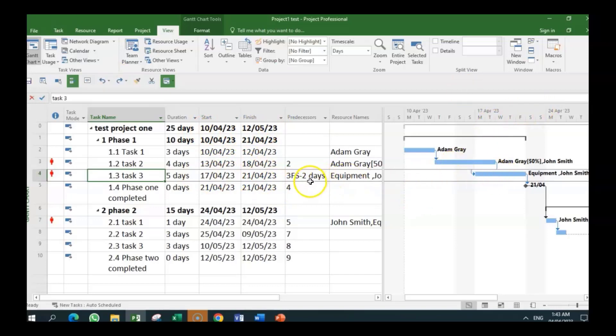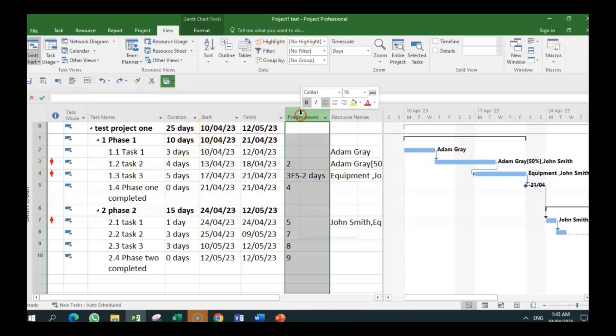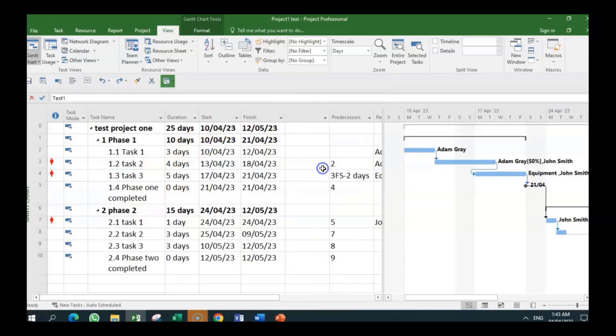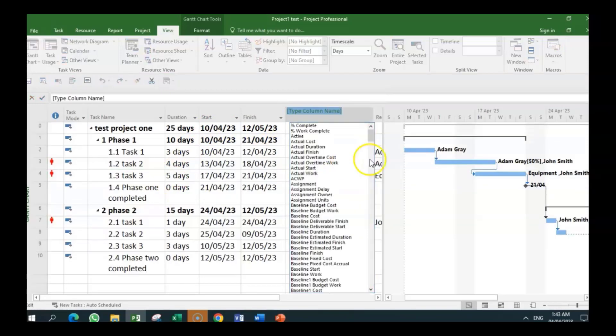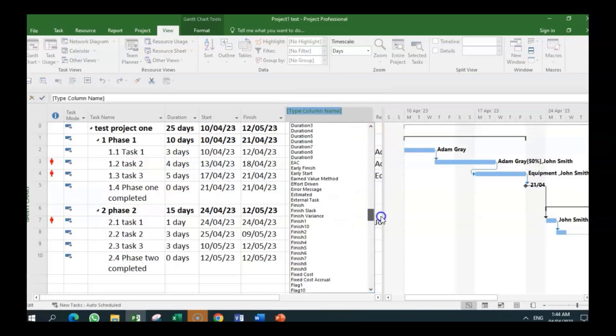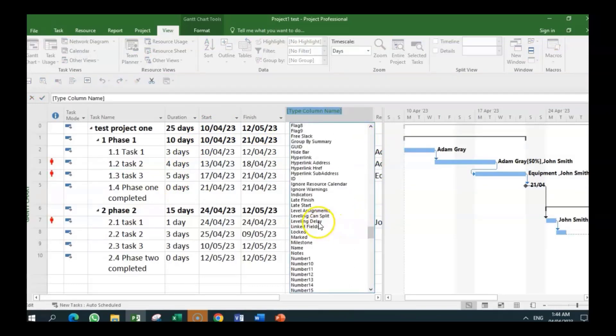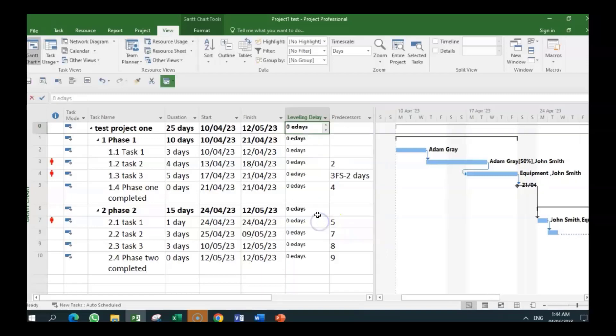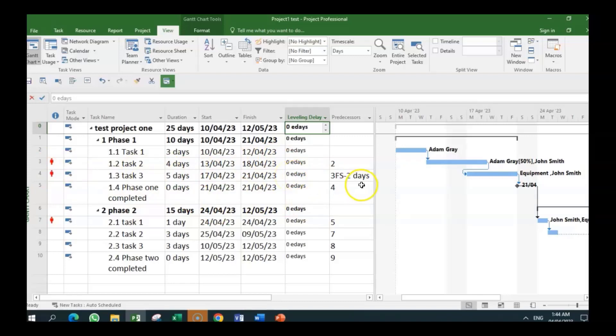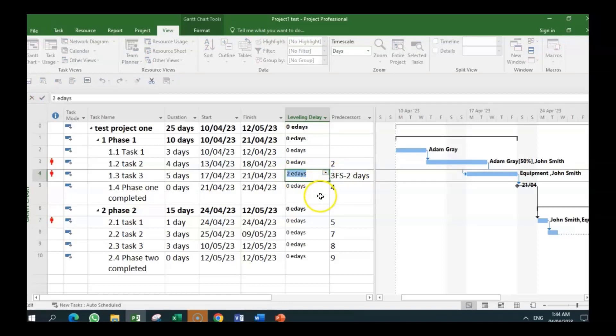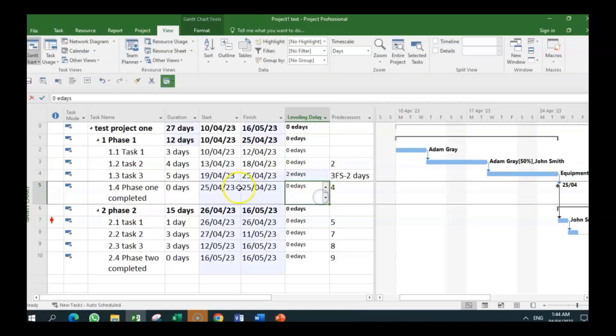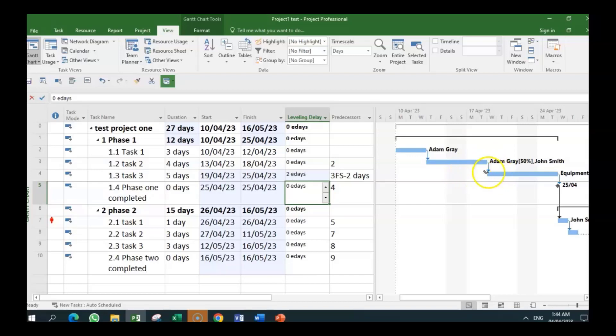So we can click 'insert a column' and the column we are looking for is a leveling delay column. And we could have delayed, for instance—you see in the red here, we could have said we're going to delay this two days. We can say we're going to do a leveling delay of two days. And we click off and we realize the over-allocation has gone, because this situation where we had this thing starting before this other one ended has been resolved.